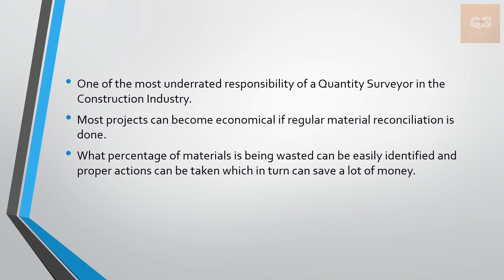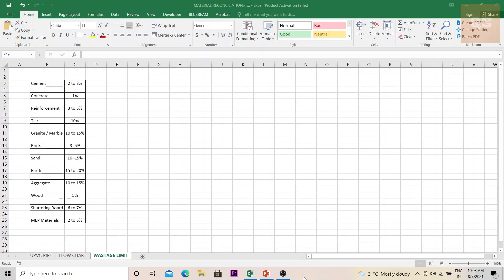If you browse the internet to find out the permissible wastage limit, you can find different articles on it. In this table I have mentioned the permissible wastage limit of some major construction materials. You can easily browse online and find out the limits, and understand for each material what the excess wastage happening in any project would be.